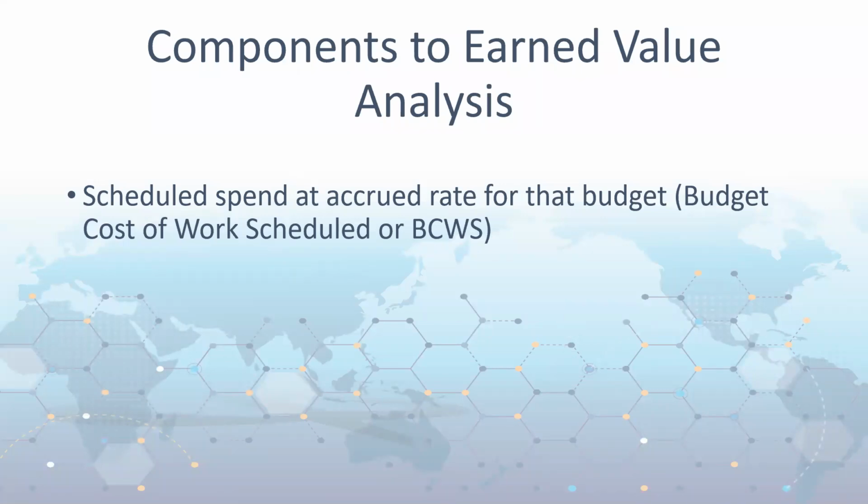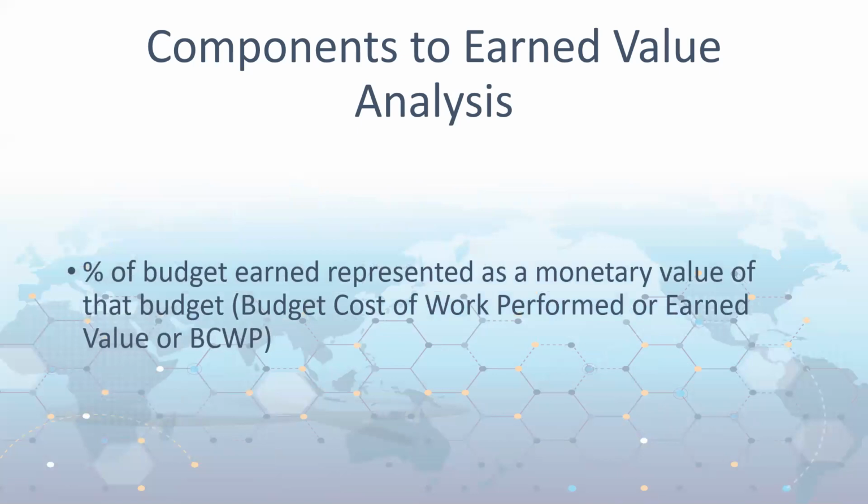So yeah, that's the second metric, and it's called budgeted cost of work scheduled, or BCWS, and it's basically the month-by-month profile of how you think you will spend on this project. So you might have a $20 million commercial building you're building. You might have a $500,000 intersection of a road. It doesn't really matter. How is that $500,000 going to get spent over time? How is that $20 million going to get spent over time? That's what we need. We need that timeline.